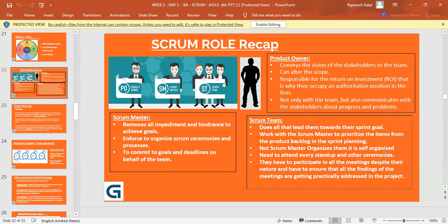So basically product backlog is like your whiteboard or blackboard, which we used to have earlier. Therein, as per your priority, you mention all the requirements. A high priority requirement will be at the top, the low priority requirement will be at the end, and they'll keep shuffling. Say changing the theme color to, I would say, orange was the customer need, and it was a very simple job. So we kept it at low, assuming it's a low priority.